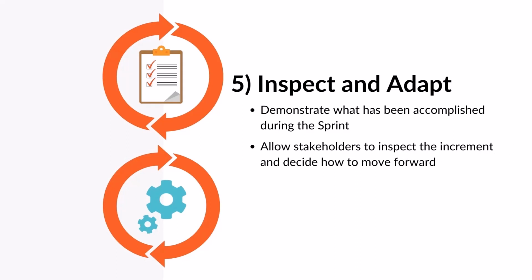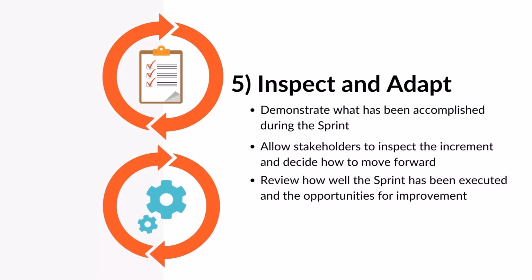Finally, in the sprint retrospective, the development team, along with the product owner and Scrum Master, review how well the sprint was executed and what are the opportunities for improvement. These improvements could be process or technical.